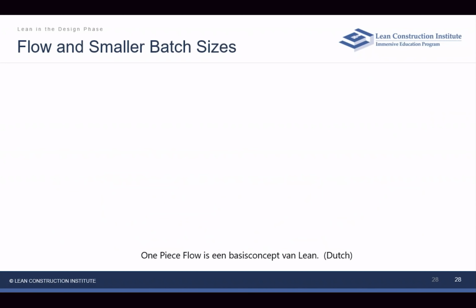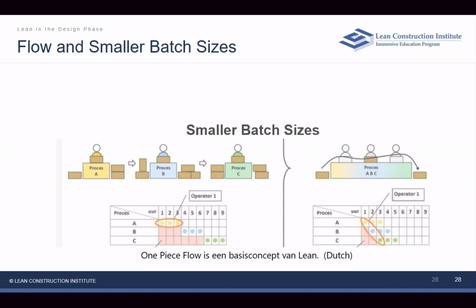Another little operational science thinking is how flow and smaller batches are related. Operations science has proved that there's a correlation of batch sizes to flow efficiency. It's true for many reasons. It helps us to reduce risk and variability. It shortens our cycle time and allows quicker feedback cycles.